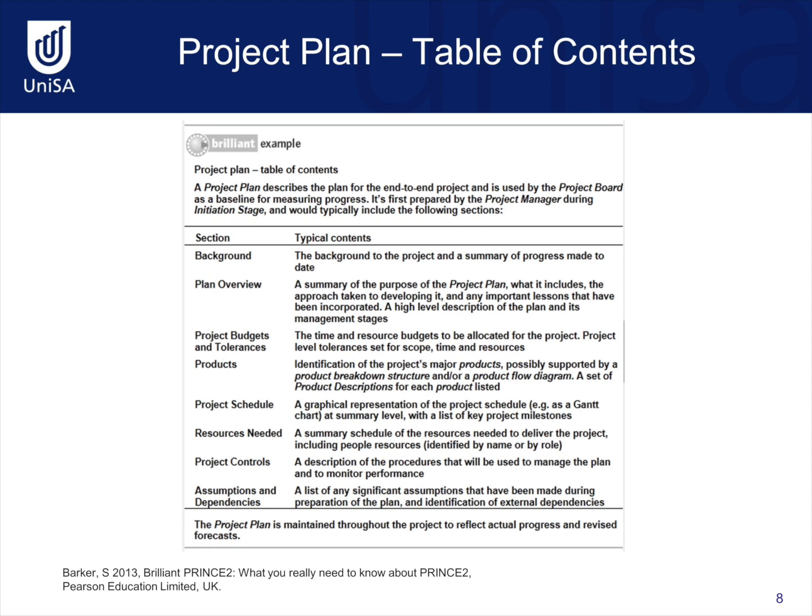What does a project plan look like? Here we can see a sample table of contents for a project plan. It describes the plan for the entire project and is used by the project board as a baseline for measuring progress. The project plan is maintained throughout the project to reflect actual progress and revise forecasts.